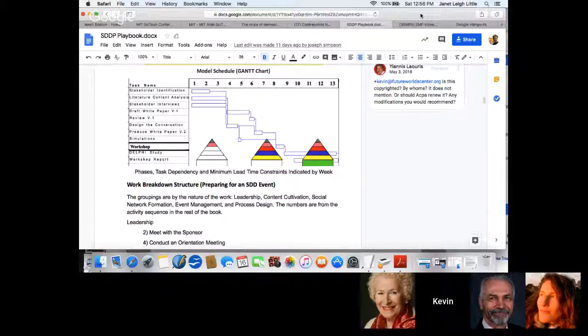Yeah, we found that setting the date for the event is one of the most critical things. A second is reserving the room. Because often, if you're going to have 36 people, that's an uncommon room to find. And rooms like that book up months in advance. And you have to find it. It's something that you can put things on the wall.